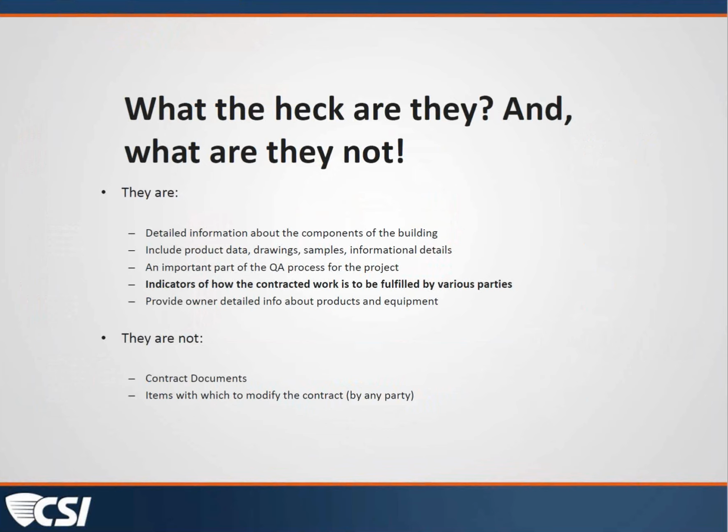Jim, let me jump in real quick. The first two comments, I think, were in line with what we were talking about earlier, but the point I would like to make here is that when we are putting together these documents, the construction documents, if there is a question about terminology, your specifications is a great place to clear it up. You can certainly, in your specifications, define record drawings, define as-built drawings, define a conformance set.